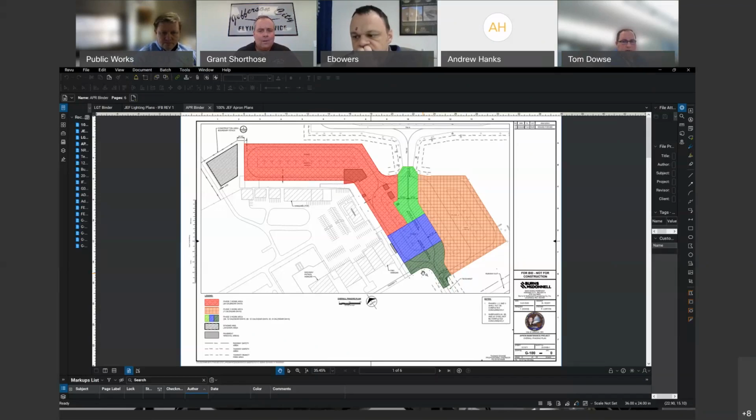I'm just going to throw out there, when working with consultants on making concessions in terms of allowing aircraft to be towed through the work area, all of these are going to be factored into the actual bidding price. So we don't want to impact the contractors needlessly or make it sound like we're constantly going to be towing aircraft through their work areas. We want to work through with them to make sure that they have appropriate access to the work areas and can get the job done. If they have a feeling like they're going to constantly have to move out of the way and clean up where they're working, we could be looking at needlessly high bid prices. So it's always a balancing act in projects like this of impact on the users of the facilities and the contractor having access to his work area.